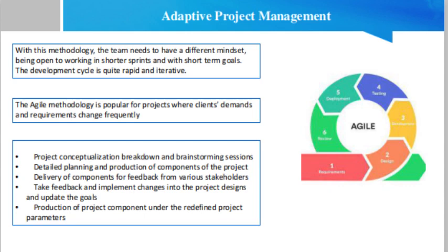In the adaptive model, teams work backward from the desired completion date. Every task is defined along with its worst possible completion date and then clubbed with other tasks with similar timelines into sprints. Dependencies between every task will not necessarily be mapped out. This allows a more flexible model, allowing for more wiggle room to adjust resources around and allows iterations due to innovation or scope change.